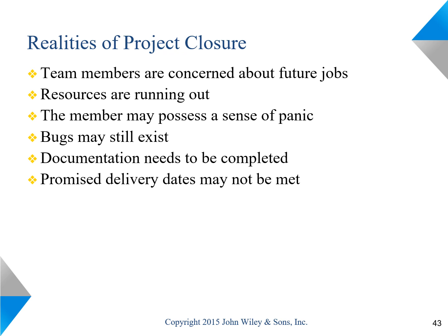There are several challenges facing the project when it gets to the closure stage. Team members are getting concerned about their future jobs. They want to make sure that they have another job lined up. Some of them actually find other jobs and move on. And there may be a sense of panic for the remaining folks on the team.